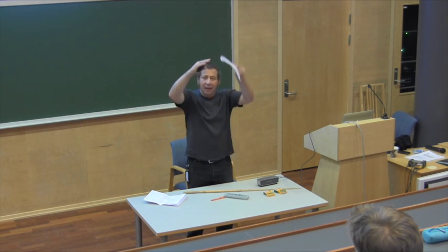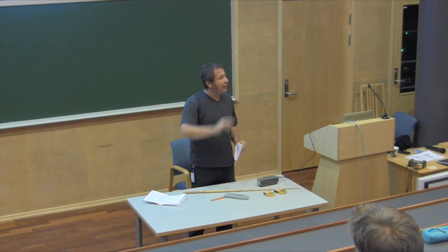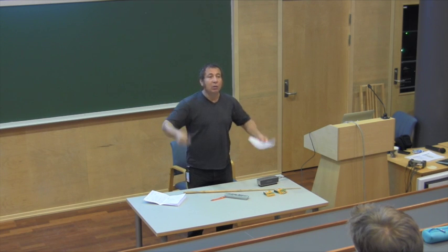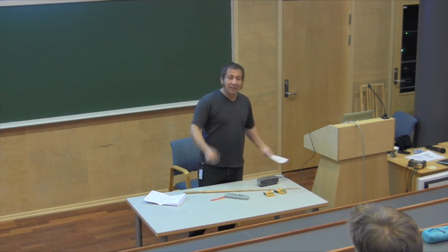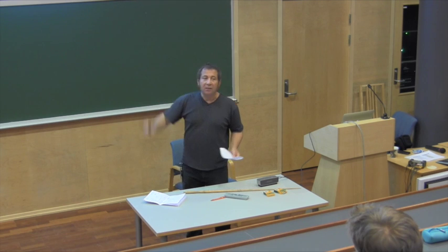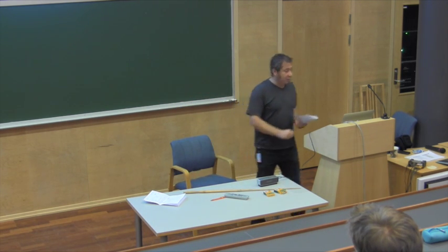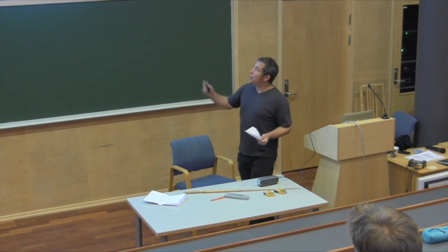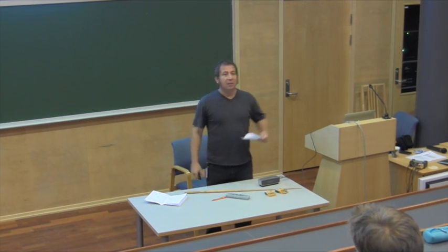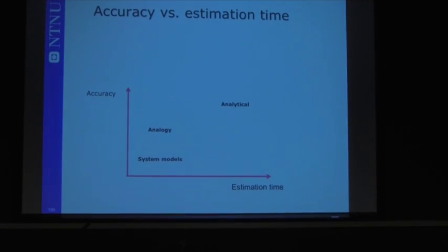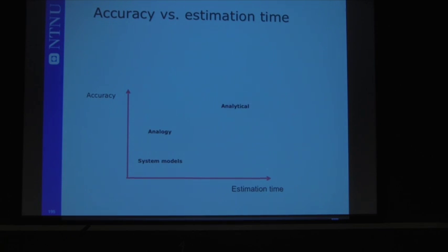Here, we break down the project into work packages, if you remember, from the work breakdown structure. So here, we actually use the work breakdown structure as a reference for developing these estimates. And as you can see, this is the most accurate. But if you look at accuracy versus estimation time, you will see that the analytical one is very accurate, but it takes a lot of time to produce. So again here, it depends on how much time you really have for your project.